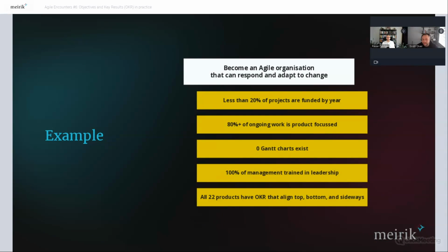Right, thank you very much, Scott. What I see from a high level, perhaps a bit simplistic, but a nice checklist: the objective has no numbers. It's literally the goal, the state somewhere in the future that we want to achieve. It's about where we want to be, as simple as that. Key results have numbers. It's not that any sentence with a number is a key result. They have to be measures. You have to be able to track them. But that's the first thing I can see that makes a difference.